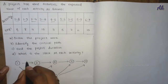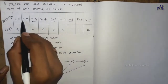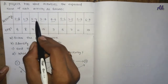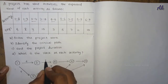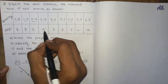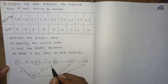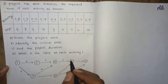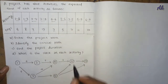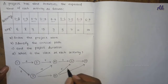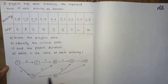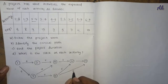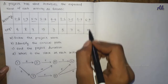Now we assign the time durations: from 1-2 the time taken is 6 days; 1-3 is 8 days; 2-4 is 7 days; 3-4 is 12 days; 4-6 is 3 days; 3-5 is 7 days; 5-7 is 11 days; and 6-7 is 10 days.